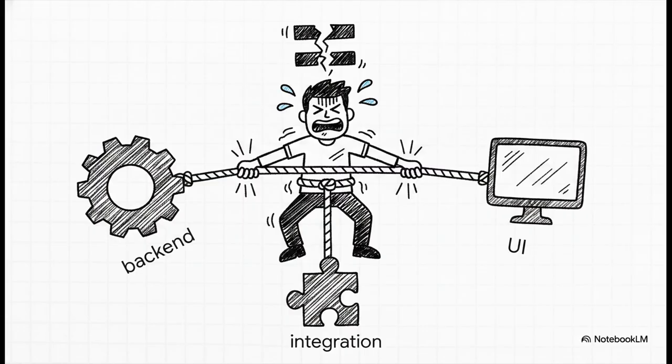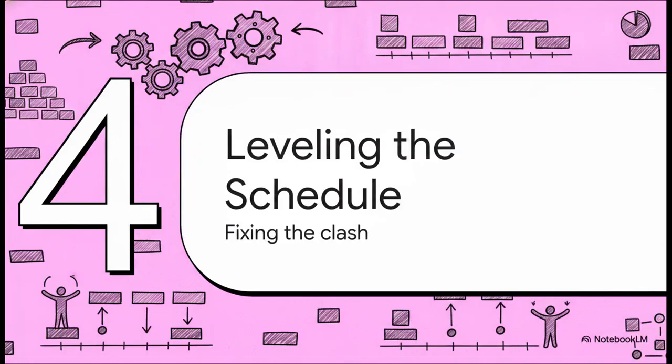And here is exactly where the math breaks down. According to our perfect 38-day schedule, back-end coding runs from day 8 to day 28. But UI development runs from day 0 to day 12. So unless Dave has somehow figured out human cloning over the weekend, this perfect 38-day schedule is physically impossible. He's required to be in 2 places at once between days 8 and 12, frantically trying to write back-end logic and UI code at the exact same time. No way.